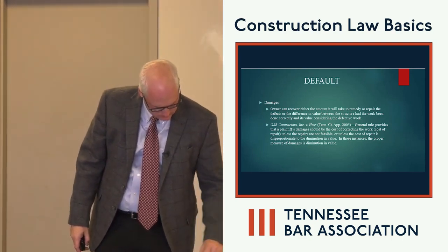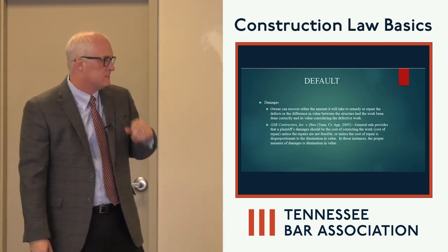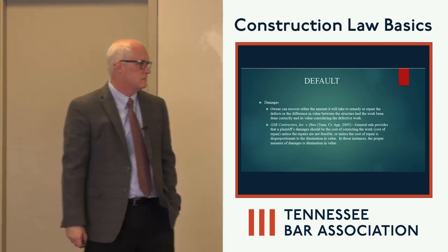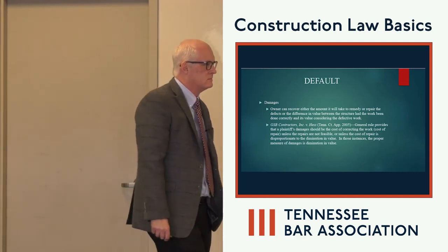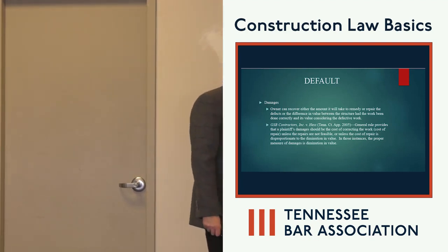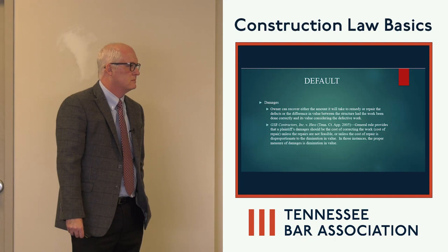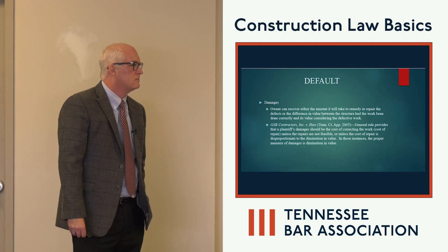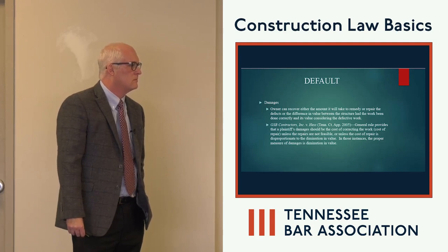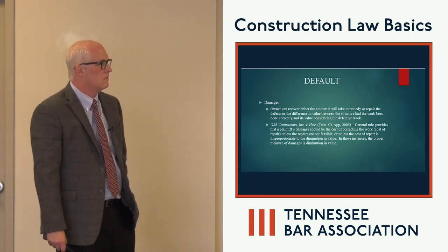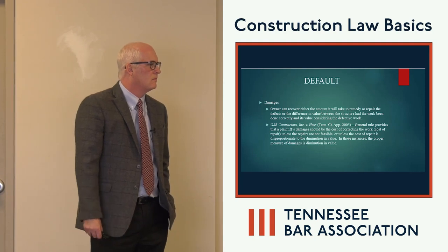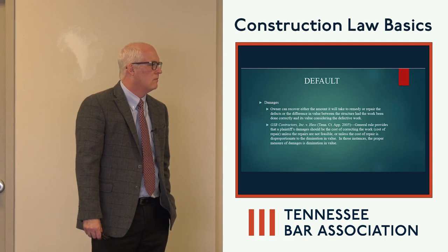We turned around and said, well, the statute said you had to give us written notice, and we had to go through this whole dance of 30 days and 10 days and reject, offer and stuff like that. And I said you have to assert as part of your claim that you've met that. And the court granted our motion, dismissed it. Because at that point, it's not just delaying the inevitable, you can't go back and do the dance. And that was my argument, like, we can never go back and conduct our statutory, it actually says assessment, not inspection, assessment of the damages. So you can never meet your obligation to give us pre-suit notice under the statute.